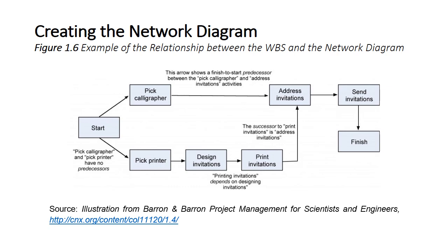The first step is to arrange the tasks from the work breakdown structure into a sequence. For instance, some tasks can be accomplished at any time throughout the project, whereas other tasks depend on input from another task or are constrained by time or resources. The work breakdown structure is not a schedule, but it provides the basis for one. The network diagram is a schedule but is used primarily to identify key scheduling information that ultimately goes into user-friendly schedule formats, such as milestone and Gantt charts.